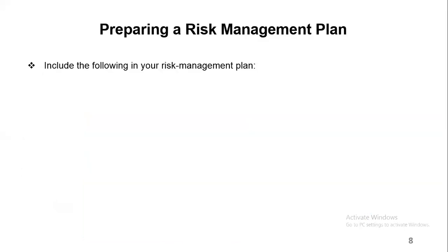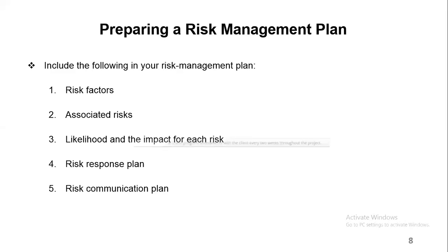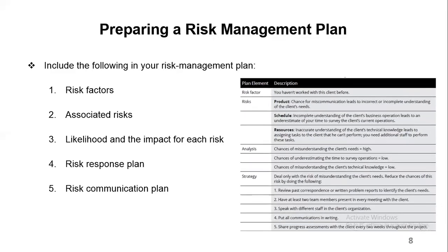Okay, and then preparing a risk management plan. The risk management plan here should have your risk factors, associated risks, the likelihood and impact for each risk, response plan, then your communication plan. That diagram there is just a typical risk management plan that you can have.